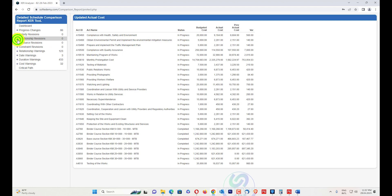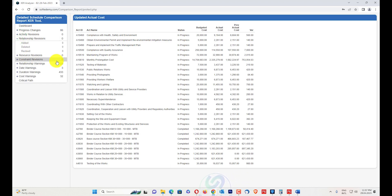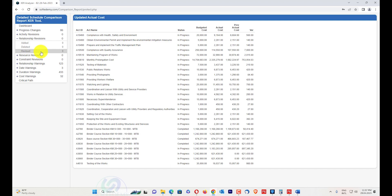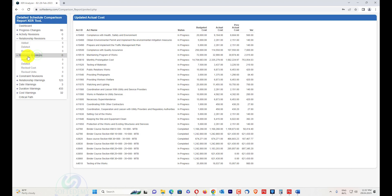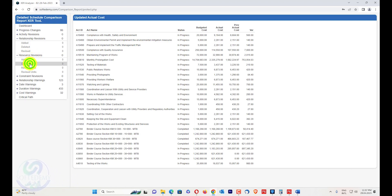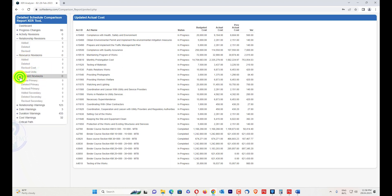Relationship revisions include three types: added, deleted, and revised. If you added a new relationship it will be shown here; if you deleted a relationship it will appear there; and if you revised a relationship — for example changed finish-to-start to start-to-start — it will also be shown. Resource revisions similarly show added, deleted, and revised resources and any cost or unit changes.